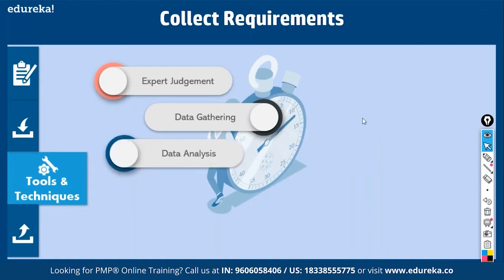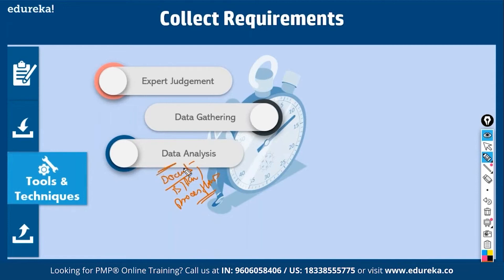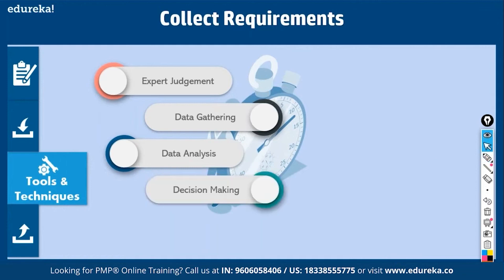Data analysis involves analyzing documents like agreements with the customer, business plans, process flow charts, issue logs, policies, regulatory requirements, and RFPs. You have to analyze a lot of data to decide what requirements to collect. Decision-making is also involved — once you collect requirements from stakeholders, you present them and stakeholders must prioritize: which requirement is important, which is secondary. Decisions can be by unanimity (100% agree), majority (more than 50%), or plurality (largest winning block out of multiple groups).